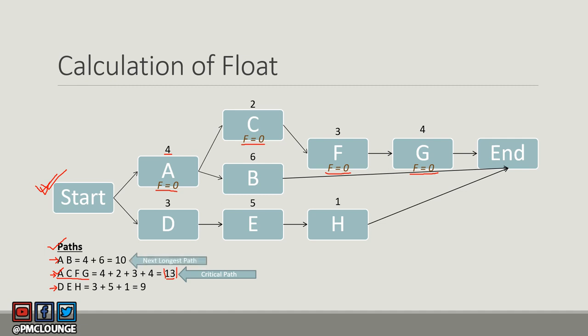The next longest path is AB with a sum of 10. You calculate float by subtracting the next longest path value from the critical path value: 13 minus 10 equals 3. This means the float for activities on path AB is 3.